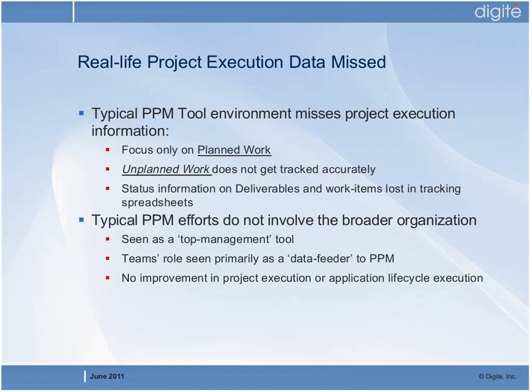Just one more slide here on unplanned work. This is something that organizations don't understand, that there is a tremendous amount of work that happens in an unplanned way. When we say unplanned, what we mean is it is not part of an actual project WBS or an actual project plan that somebody wrote up. So a lot of work happens outside of the PPM work breakdown structure or the PPM Gantt chart, which doesn't get tracked.